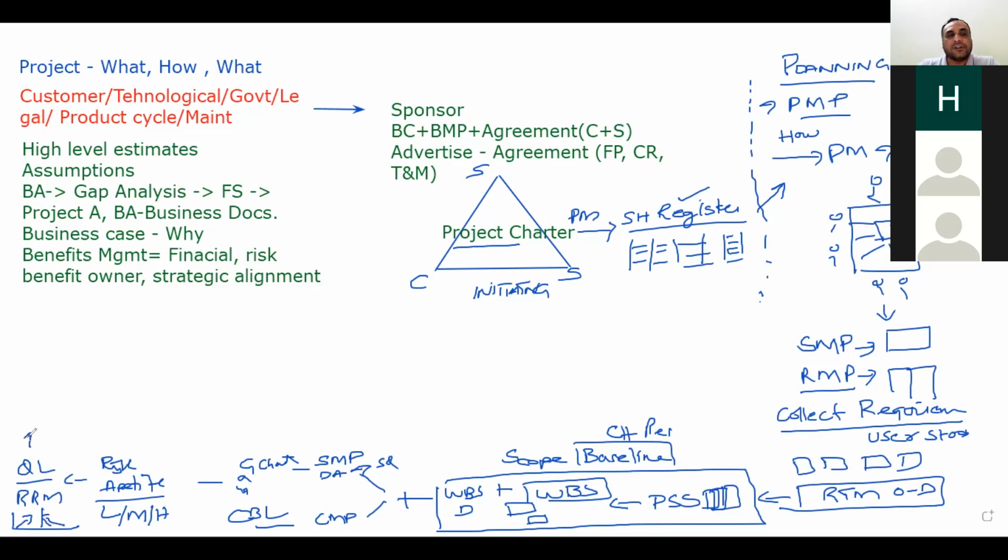If we still have uncertainties, then we run the quantitative risk analysis. We can use sensitivity analysis, tornado diagram, Monte Carlo simulations, or decision tree for this purpose. So we can find out what the chances are to finish the project in some time, or what things can impact the project objectives. What are the project objectives? Scope, schedule, cost, or quality. So you have done the risk management also.